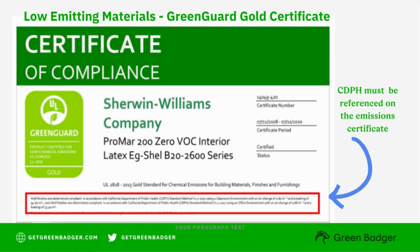CDPH certificates are provided by a number of organizations. UL GreenGuard Gold is one of the most common certificates, shown here for a Sherwin-Williams product. It shows the manufacturer, the certification period, and a section showing the product has been tested in accordance with the California Department of Public Health 2017 standard. This type of emission certificate is required for any product in any of the eight categories to be considered compliant.